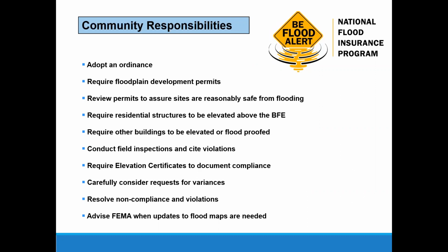And then conducting field inspections. And I think this is something that gets missed a lot, or people just don't do it, but you really should be doing field inspections for new buildings to make sure that when the foundation is going in, that it's high enough. And so that may be something you want to work out with the property owner on their construction schedule when the foundation is going in, so that you can work with the developer to make sure that it's high enough, because it's a lot easier to fix an elevation problem before the entire building is completed.